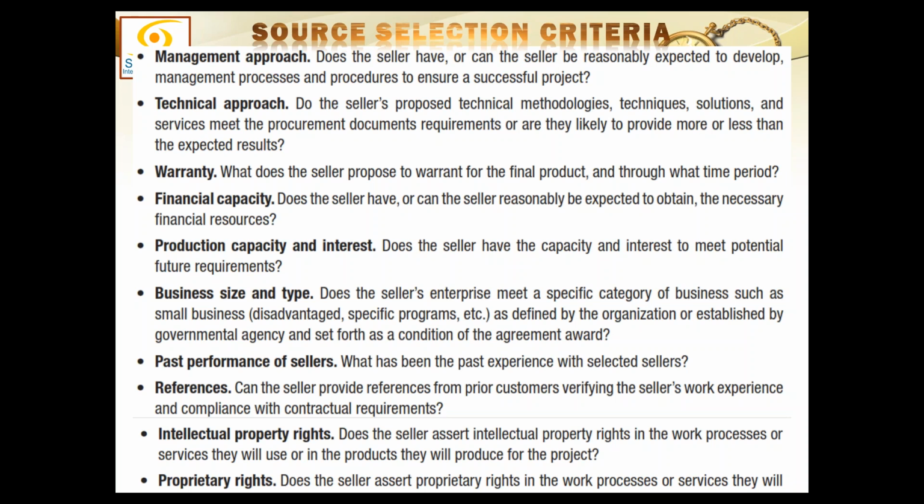Intellectual property rights: who will hold the intellectual property rights of the job? And any proprietary rights? Does a seller assert any proprietary rights in the work processes or services they will use, or in the products they will produce for the project? Do they have any proprietary systems which will be used? Because if they have any proprietary systems, they will charge extra for that.